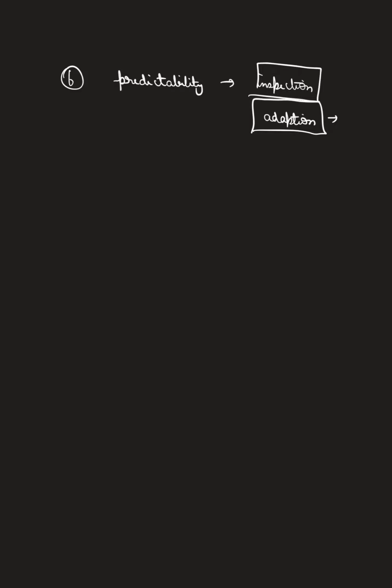And when a sprint horizon is too long, the sprint goal may become invalid, complexity may rise, risk may increase. So the sprint should be shorter as much as possible. For risky projects, your sprint needs to be shorter. You need to keep this thing in mind.